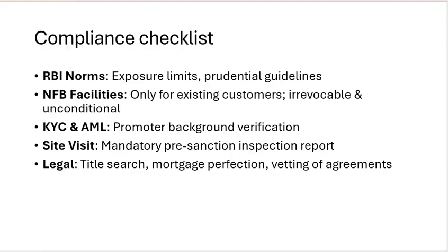Then site visits. The lender's independent engineer visit is the most important, to track the report of the lender's independent engineer, which is a mandatory pre-sanction inspection report, to track the progress of the infrastructure site, understand the goals, and understand whether it is achievable for the project to be completed before the commercial operation date. So we will actively visit the site and look at the construction progress. Then the legal aspects: title search, mortgages, perfecting security, and the guarantee will happen.